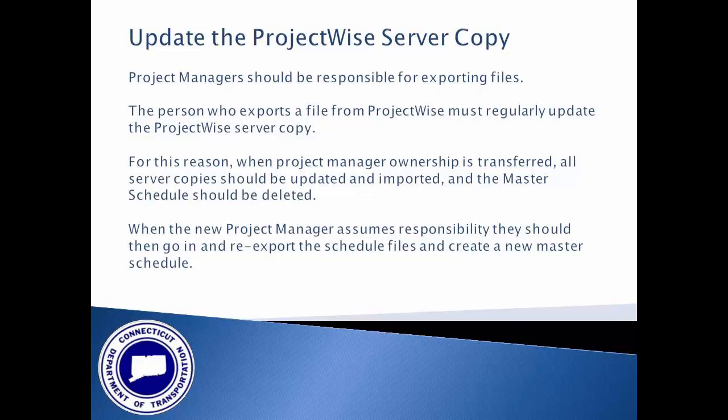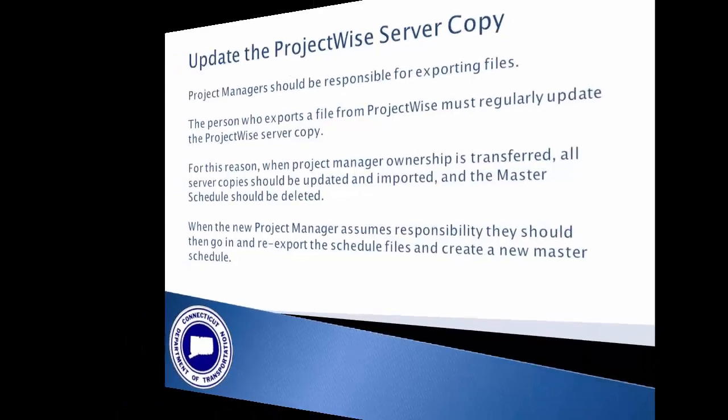If a new project manager is assigned, it is critical that the project manager imports all their project schedules prior to transferring schedule ownership. When the new project manager assumes responsibility, they should then go in and re-export the files and create a new master schedule.